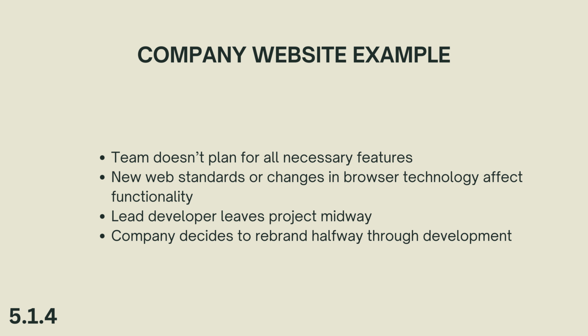The company might undergo rebranding during website development. To handle this, maintain open communication channels with company leadership and build flexibility into the design to accommodate potential changes.